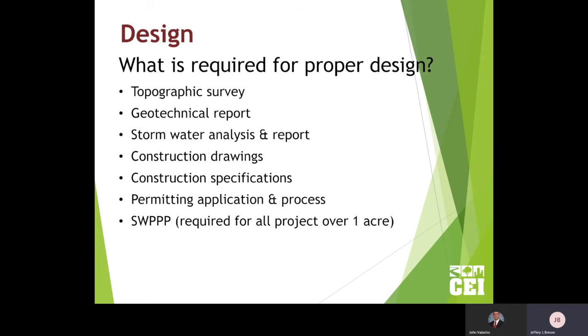One little example I put on the regulation side is a SWPPP, or a stormwater pollution prevention plan. You have to do this. Governments make you do things, and if you can't do them, they'll shut your project down. As engineers, we provide these things and work with the contractors to make sure they've got what it takes to keep the regulation up to date and compliant, and again, no issues. So that's kind of what that boils down to in design.